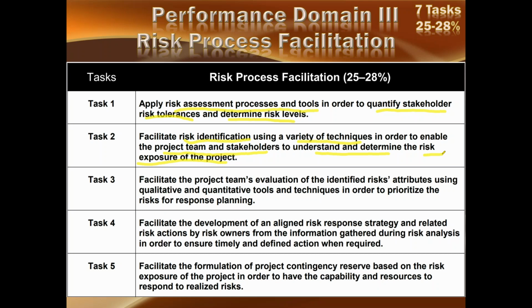Third task here is facilitate the project team evaluations of the identified risk attributes using qualitative and quantitative tools and techniques in order to prioritize the risks for response planning. So we are guiding the identified risks to proper thorough analysis through qualitative and quantitative tools and techniques, and ultimately prioritizing the risks for developing the risk responses. So this is the complete path, this is the complete flow, how the risk will be processed. Again, you can see, you can easily get 3 to 4 questions out of it.